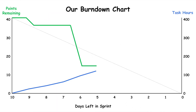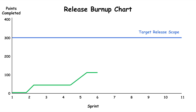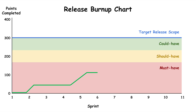Some teams will burn up task hours completed and burn down story points remaining on the same graph. You can also use a burndown or burn-up chart to track progress against a release. Instead of measuring story points and days remaining in the sprint, you can track — even loosely — estimated story points across all stories in a given release against sprints. If you've done robust release planning, you can even indicate which of these points reflect must, should, and could release stories for any given release date.